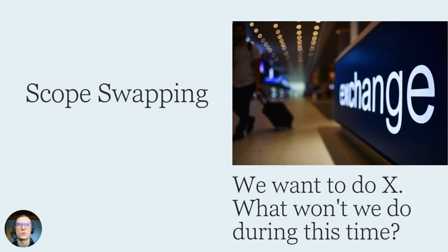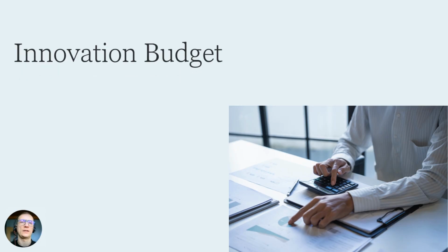instead of telling the project owner that no, we will not be doing something. Let's show them what changes it might have and what impact the changes they are introducing could have on the project. So we can do this new functionality X, but in exchange for what exactly? We have a project backlog. We have a list of things to do prepared. So dear product owner, okay, decide what should be first, or instead of what this change should be introduced. Maybe we don't need this system element, maybe that one. It's important to show that these changes aren't cost free.